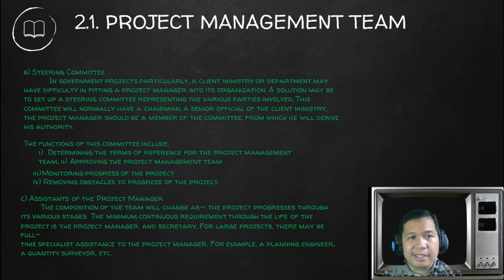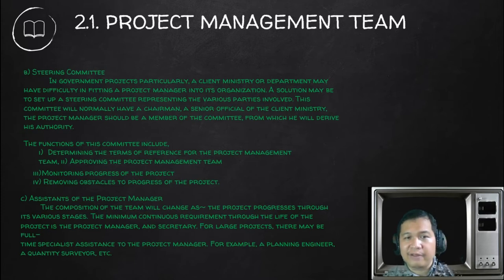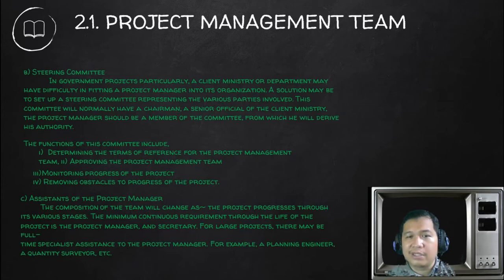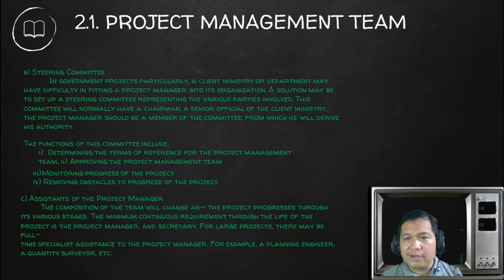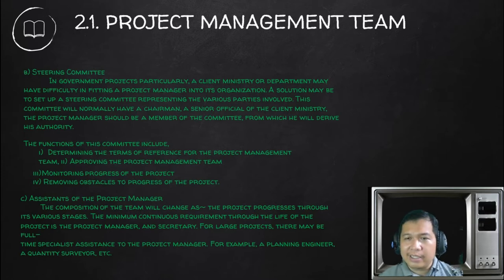Regarding assistance to the project manager: as the project progresses through its various stages, the minimum continuous requirement through the life of the project is the project manager and a secretary. For large projects, there may be full-time specialists assisting the project manager — for example, a planning engineer or a quantity surveyor. The quantity surveyor's function is to estimate the quantities for the project. The planning engineer makes sure that the project is well scheduled and all activities are laid out.